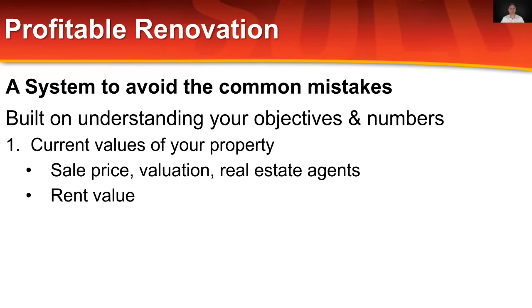Let me take you through the system, because this is a sequential approach. The first thing you want to do is get the current value of your property. Why? Because you need to know what you're playing with. You need to know the foundation or the base on which you're looking to improve from. If you don't know what the value of your property is right now, then the chances are that you don't know whether you've made money or not. The chances are you don't know how good a job you've done or not.